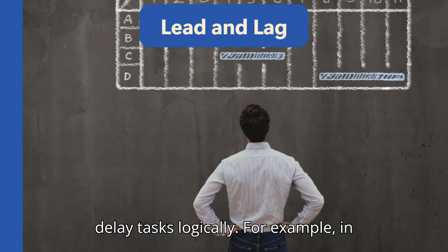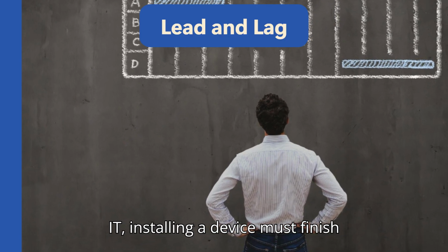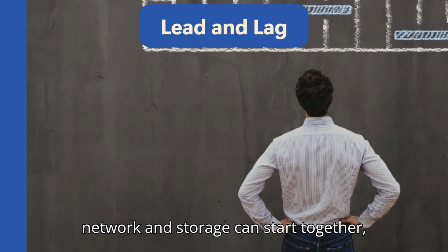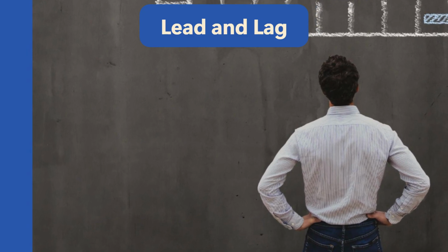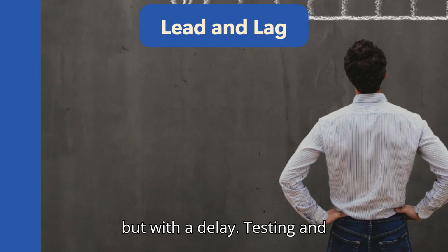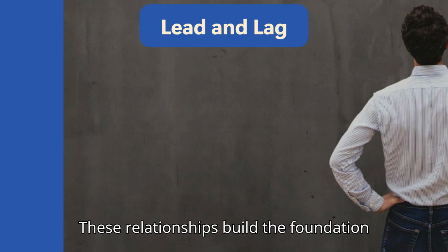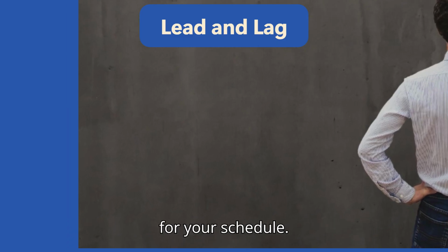For example, in IT, installing a device must finish before configuration starts. Configuring network and storage can start together, but with a delay. Testing and documentation may finish simultaneously. These relationships build the foundation for your schedule.